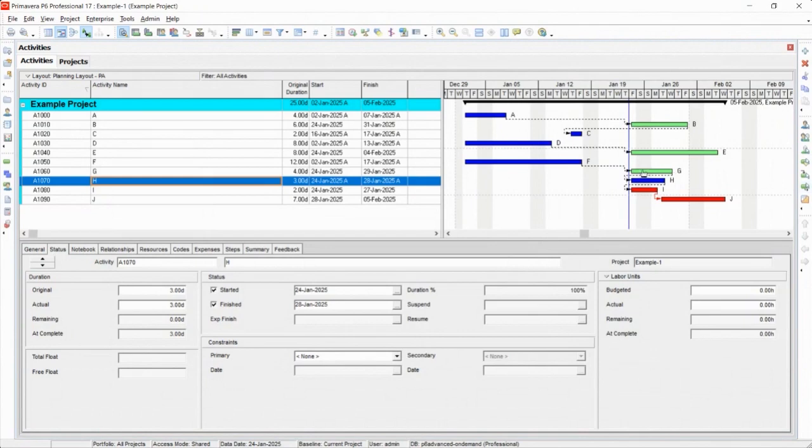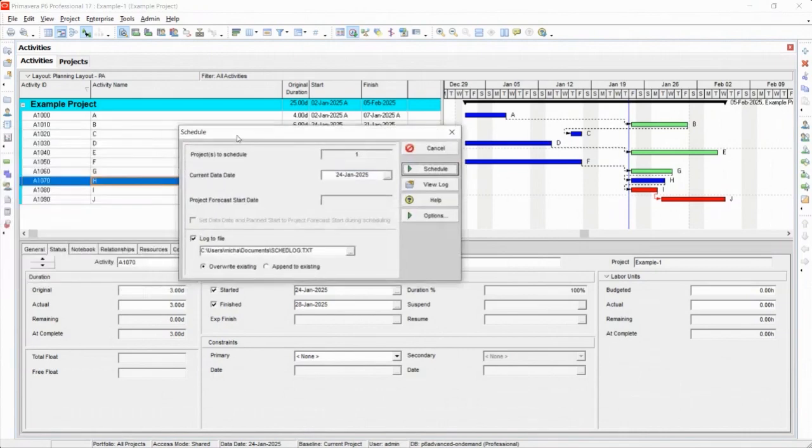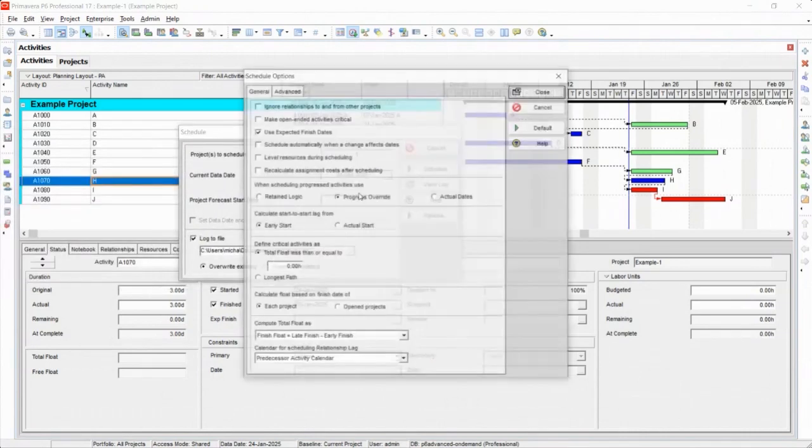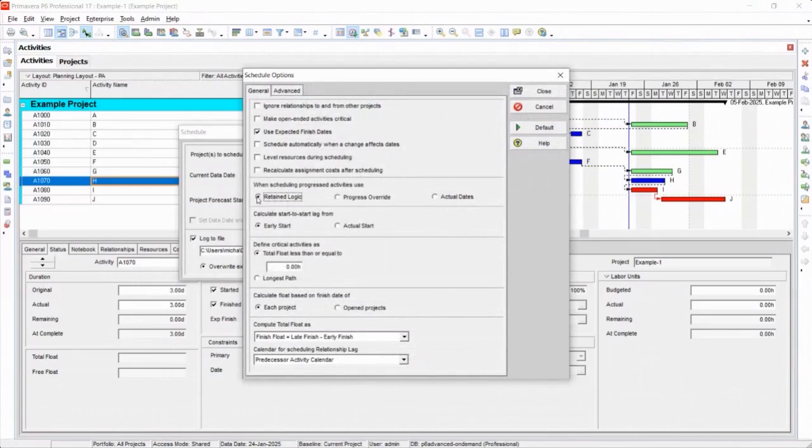So that's why it says, well, okay, so you should do G and you should do I, but just do them at the same time. So this is a different result. This is much more flexible, but when we get back down to brass tacks of CPM scheduling and planning and scheduling, most companies and most experts will say RetainLogic all the time.